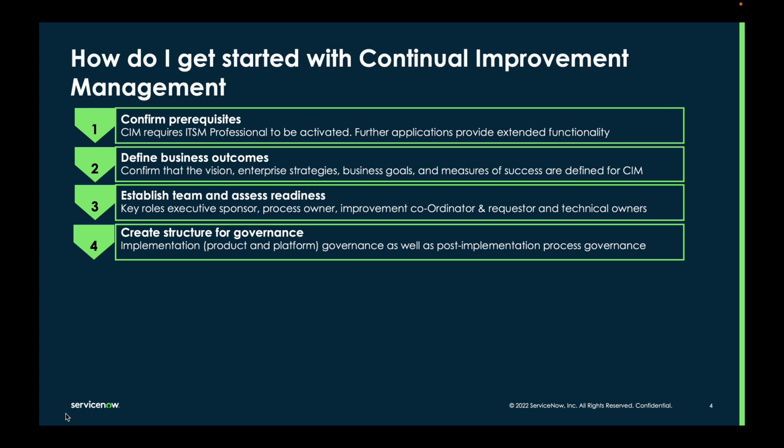Define a meeting cadence, agenda, and clear decision process. Include regular review validation of project objectives, ensuring that they align to enterprise strategies, outcomes, ease of use, upgradability, and prioritization of new and existing demand. Technical obstacles and strategies for resolution. Work with your executive sponsor and platform owner to develop a responsibility assignment matrix, RACI, to establish a common documented understanding of decision rights for the implementation project and ongoing maintenance.